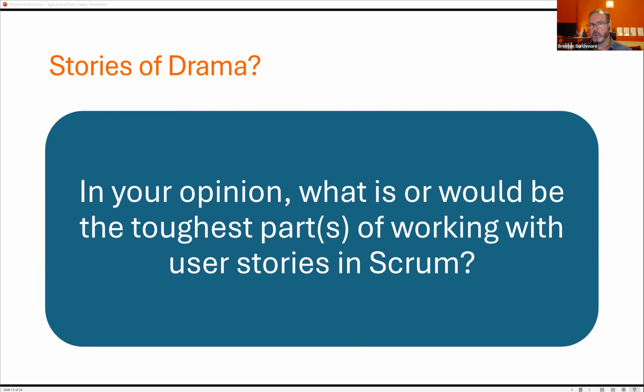Now, technical stories are simply the pieces of work that must be done. Before you can put data into a database, you need to build a database. And that's an example of a technical story. A user isn't going to tell you, write a story that says, oh, I want a database. No, they're going to say, I want my data on my screen to look like this. So the technical story would be to build a database with a structure behind it.